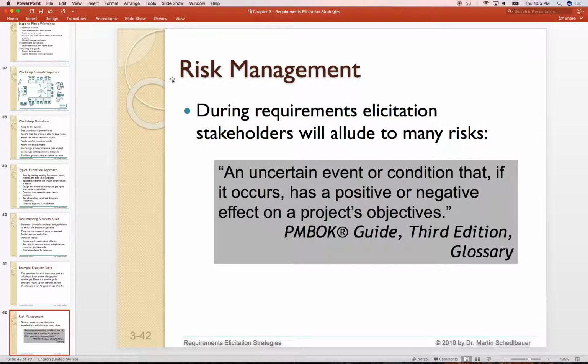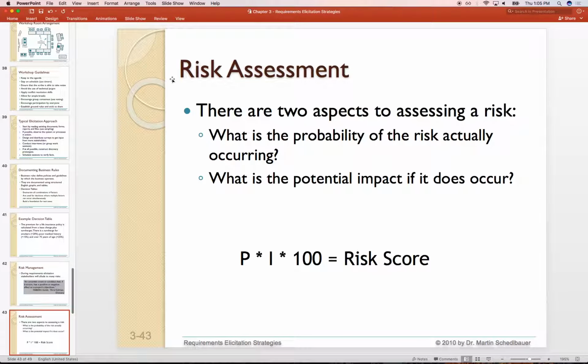So it's important that we do indeed document what everybody says, how the sky is falling, and what is actual, to try and see what's a perceived risk versus an actual risk. And we have to challenge them. And risks have 2 aspects to them: how probable is it that what you're saying is actually going to happen? Is it definitely going to happen? Is it maybe? How do you feel about that?